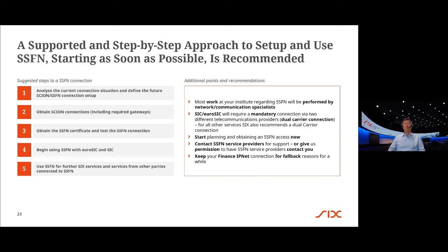Why wait for the certificate here? Certificates in any SCION-based network are short-lived, so that's why it's prudent to wait until you're fully set up, and then get your initial certificate and install it right away, so that afterwards the automatic renewal process can be started. Otherwise, you have to get the initial certificate multiple times.